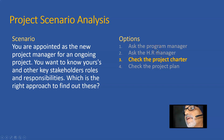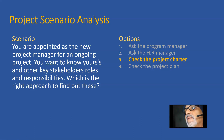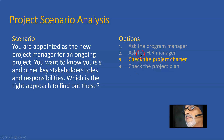Maybe asking the program manager is also a right option. Ask the HR manager is also a right option. Check the project plan is a wrong option because the project plan doesn't have the business case and roles and responsibilities of the key stakeholders. All the key stakeholders will not be there in the project plan — maybe the team's details could be there. So project plan we can rule out. Ask the program manager may be right. Ask the HR manager is right. Check the project charter is also right.